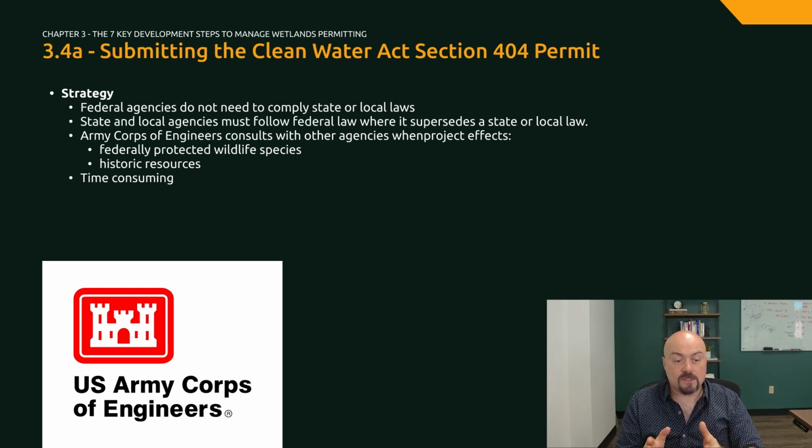As these time-consuming consultations ultimately add up to about 9 to 12 months or more to process a wetlands permit, and also will need to be coordinated with your city or county entitlements, we recommend starting this process with your initial map or land use application early.